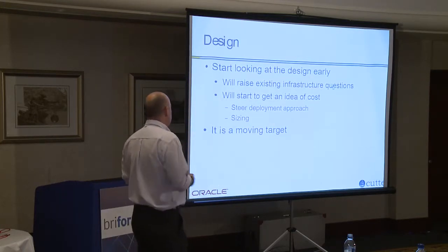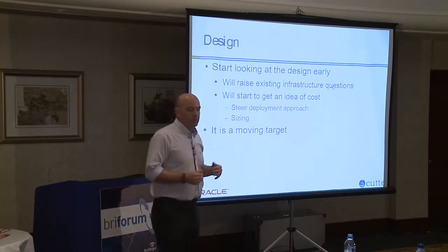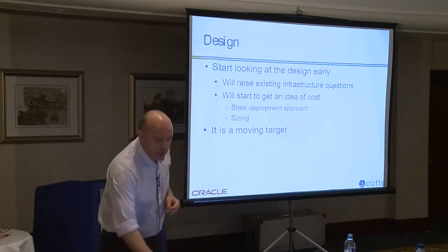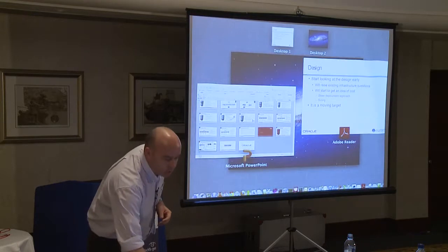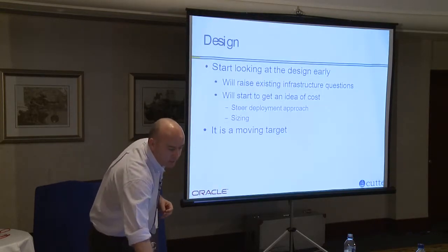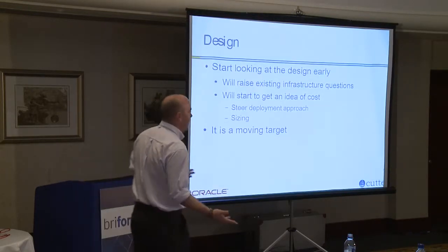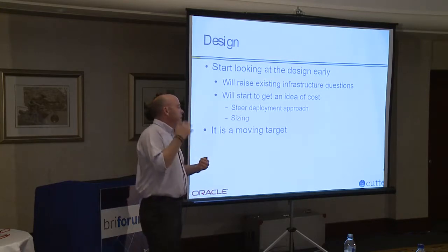Start looking at the design early. It'll identify those infrastructure questions. Like, have you got enough power? Is your data center big enough? Do you have enough bandwidth? It will start getting an idea of cost.